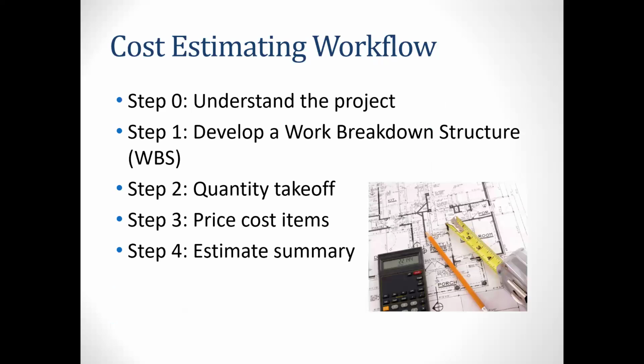We will break it down into details later when we're doing the labs, right? What follows for assembly estimates is that you also need to understand the project. You need to develop the WBS, which is based on UniFormat, right? You do the quantity takeoff as a group of some items, right?